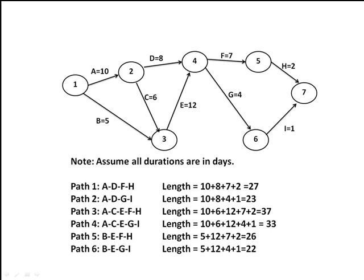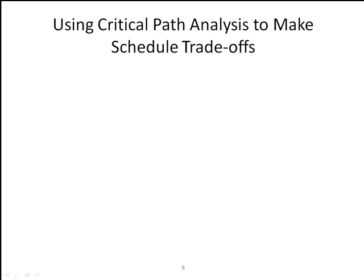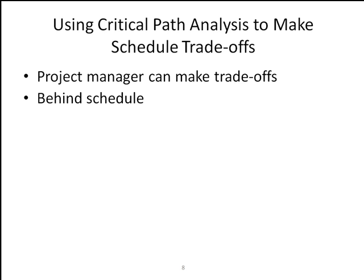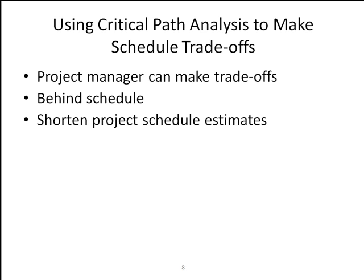So the critical path shows the shortest time in which a project can be completed, which is the longest path. If one or more of the activities on the critical path takes longer than planned, the whole project will slip unless the project manager takes corrective action. It is important to know the critical path throughout the life of the project so that the project manager can make tradeoffs. If one or more tasks is behind schedule, the schedule could be renegotiated with stakeholders, or more resources allocated to items on the critical path. It is also common for project stakeholders to want to shorten project schedule estimates, so you need to know the tasks on the critical path to allocate between dependencies.